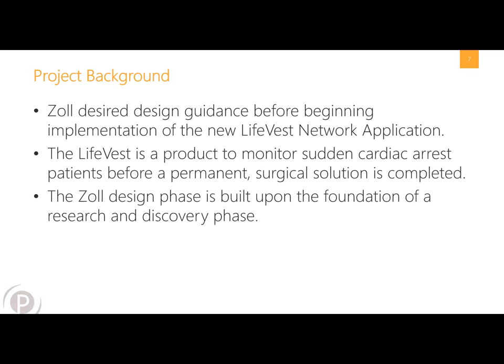There were actually two phases to the project. The first one was a research phase, which I was not intimately involved in, but I consulted on. We had two consultants go in and research, sit down with stakeholders, understand the business needs of the project, in this case the redesign of the application, and then go through a series of structured interviews with salespeople and management about the goals that need to be accomplished through the application. We then put those together, generated some hypotheses about where to go forward, and then we started the design phase, where I came in as the lead designer.